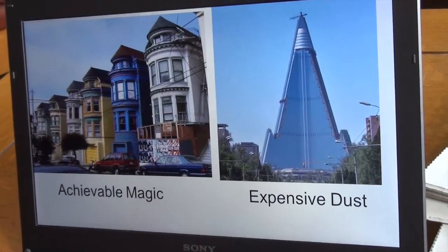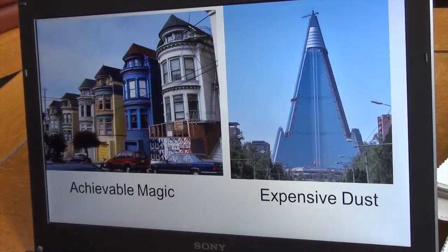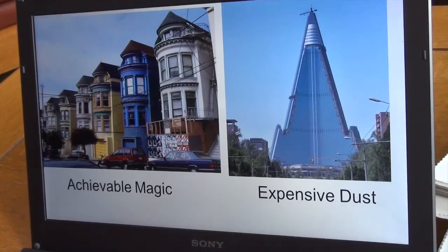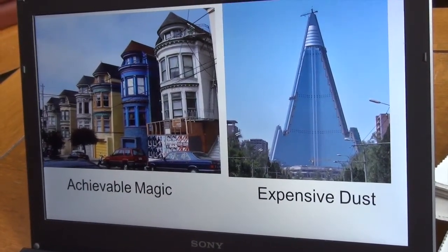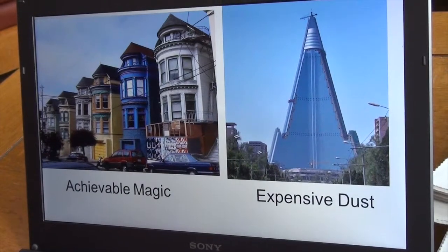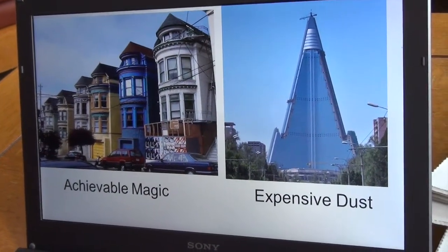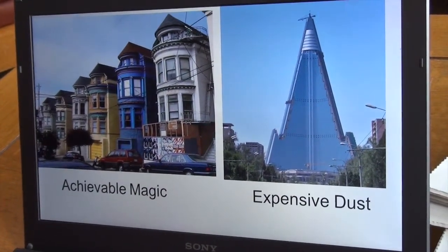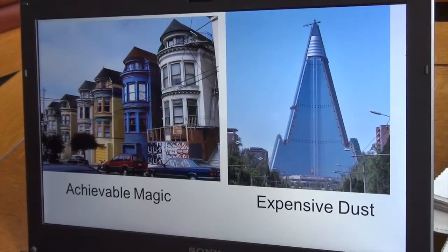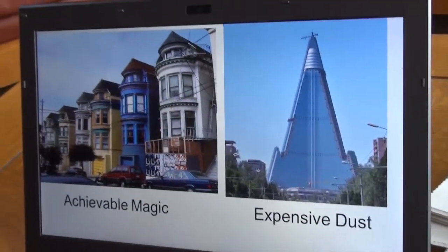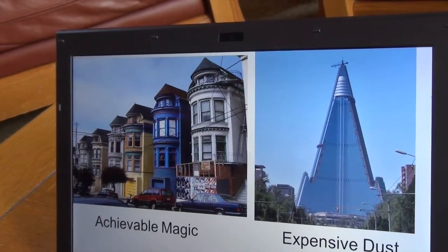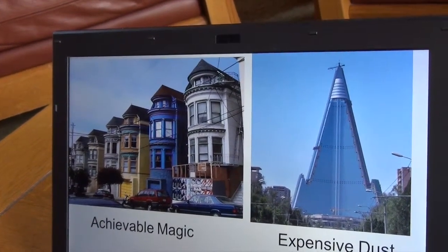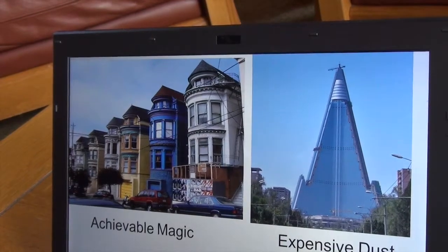This is why for Slice Fraction, we chose to do a 2D game with a very conservative formula. With our time and money constraints, we couldn't really do 3D or a lot of features, because with these types of features, we'd be really constrained on resources and would have barely achieved the minimum. I think it's really different than just saying think small. It's more that we realized that a lot more magic would come out of polishing our product over and over, rather than just adding more bells and whistles.